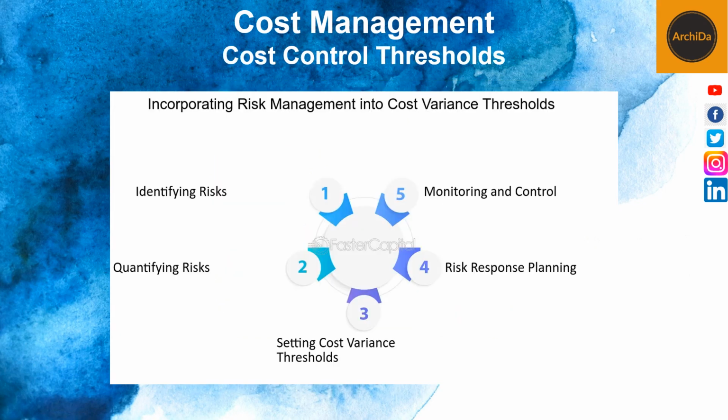Next is cost control thresholds. Establishing thresholds to monitor cost performance is important. This simply means that when cost variation reaches a certain percentage, the project team will take cost management actions. Control thresholds help you manage the control cost of a project throughout the completion. These figures depend on the project size and budget and help you stay within budgets and deadlines.